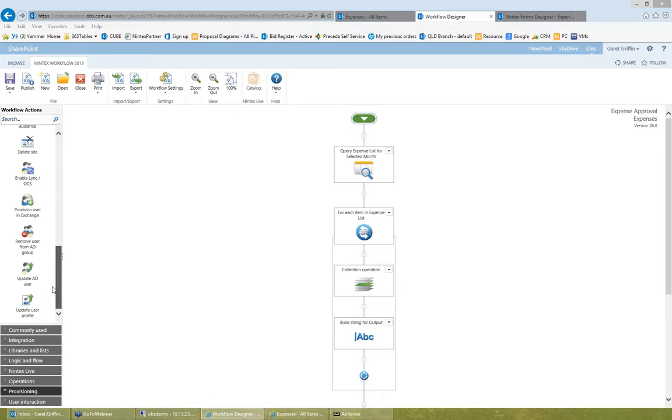So I was managing a series of IT projects based on a templated project site that contained task lists, risk registers, and document control the way I like to use them. In that particular case, it was a Prince2 model that was applied. And all of the provisioning of that SharePoint content and those structures were completely automated by Nintex workflow.